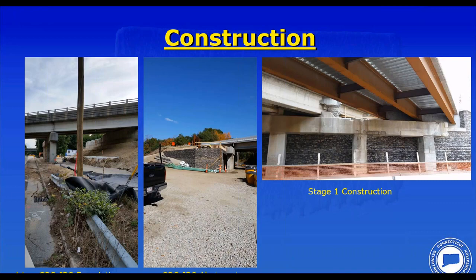However, we want to use GRS IBS, which is considered an ABC method. And why is that so? Because GRS IBS bridges can be built very quickly, and also they can be built underneath existing structures fairly easily.